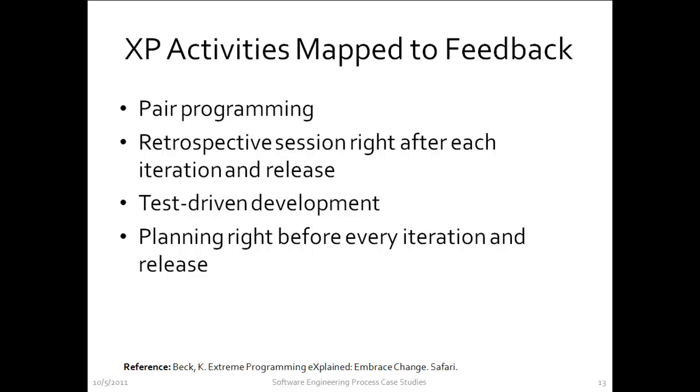And the third activity regarding rapid feedback is that there is planning right before every iteration and release. So just before every iteration, there is planning. Then after that iteration is complete, there's a retrospective. And then before the next iteration, there is planning, and so on.